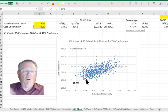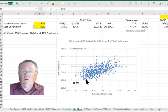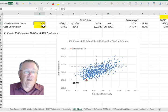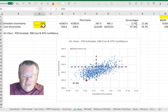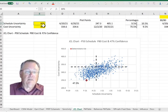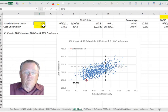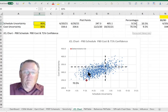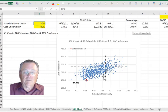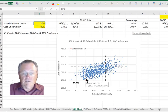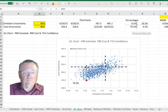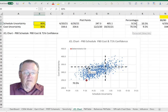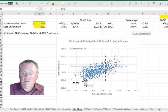So what would it take to get the 70%? It turns out if I increase this to 80%, I now have a 70% confidence that I will meet both cost and schedule. I have increased my contingency that I'm going to have to allow for from 250 to let's call it 340. So I now have 90 million dollars in contingency.